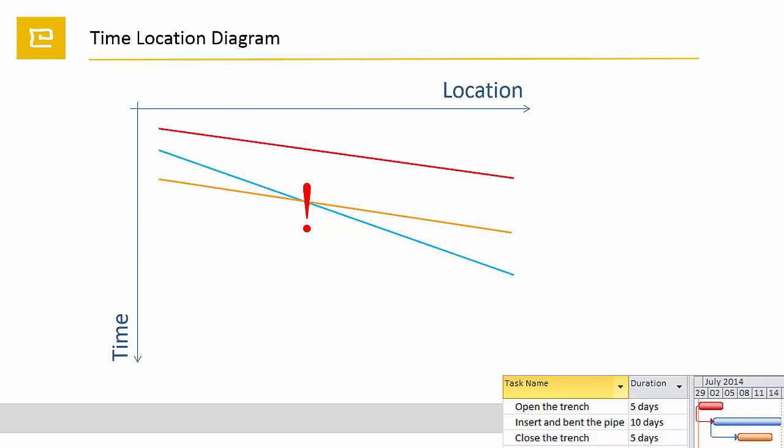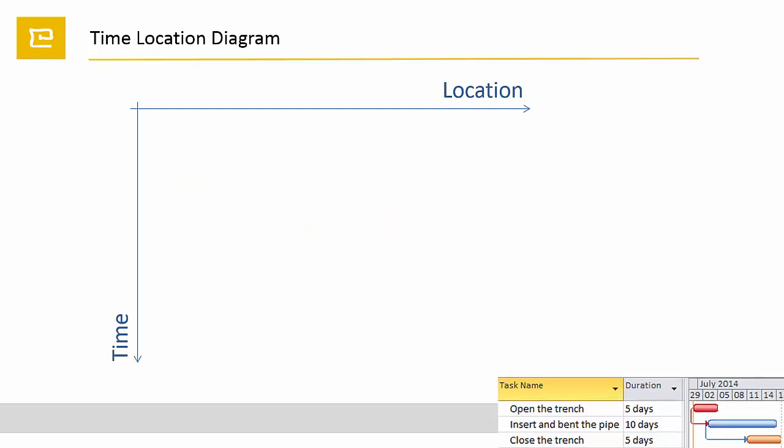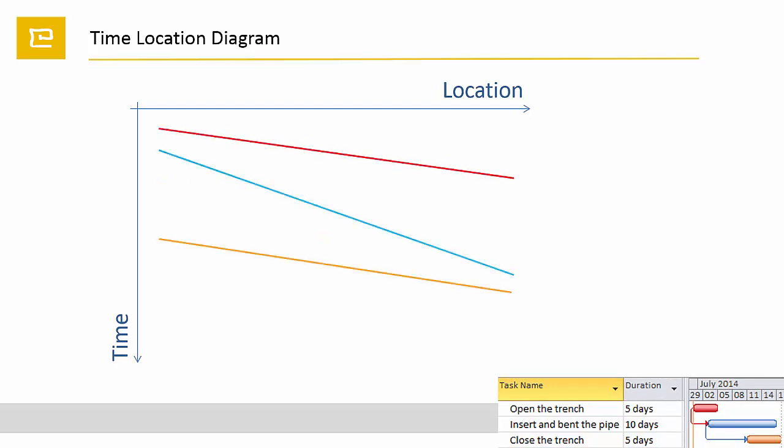So here is the best result. After trench opening activity has reached some distance, the pipe-laying activity can start. As it is slower than its predecessor, there will be no clash. The pipe-laying task works slower than its successor, so trench closing is not allowed to start too early if you want to avoid a clash.